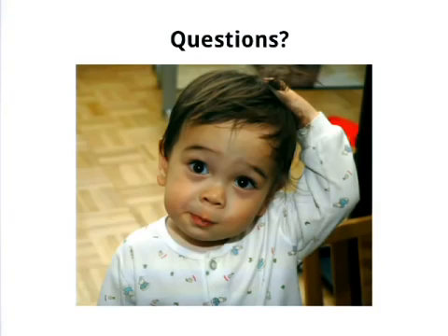And if you can't live without anything, then what you can do is say, there's 10 things in here, we think we can do 6. If we simplify those 6, we can do 8. If we simplify them even more, we can do all 10. There are a lot of options, and I think a lot of clients that might have been afraid of Agile at first find that really comforting and actually really cool. They don't have to fill out a change request every time they want something, and you're not constantly fighting them and saying, actually, that wasn't in the RFP, so we're not going to do that unless you pay us more. I find that they actually quite prefer that.